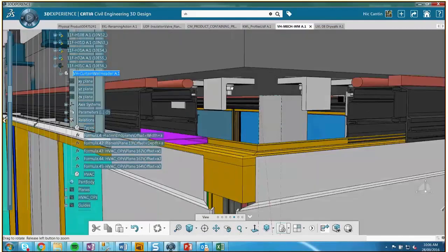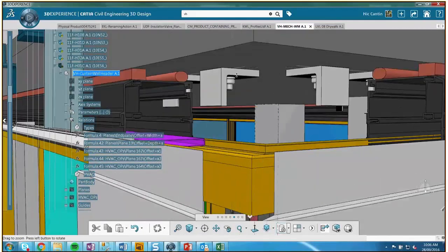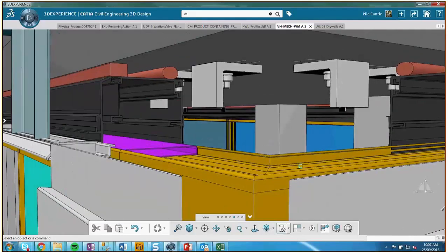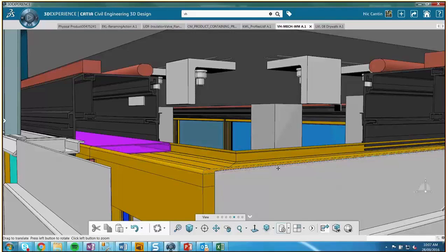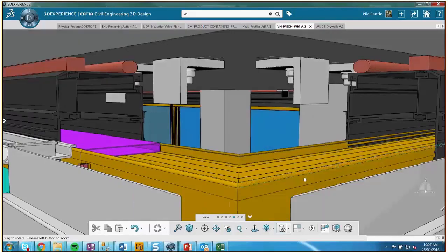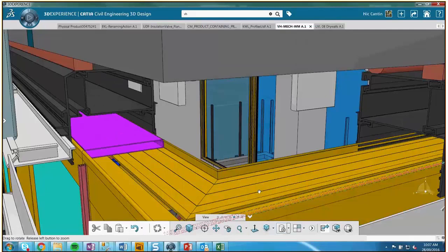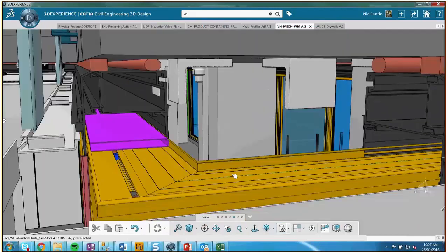The embeds are overlaid with ISA anchors, facade panels, riser penetrations, everything's coming from this one model, from the formwork trade through to the facade fabricator. And that's helping us all get in front of some of these issues as best we can and find solutions with a final output that goes to the build. So they're building from this.